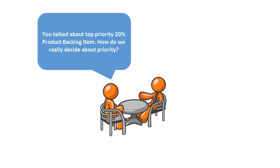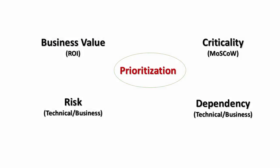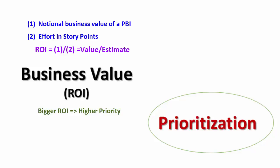You talked about the top priority 20% product backlog items — how do we really decide priority? First, you need to tell us the notional business value, say in dollars, for every deliverable. This helps us compare items. We then estimate the efforts in story points. The ratio of these two gives us an ROI figure: ROI equals business value divided by estimate in story points. We then take the higher ROI items first.